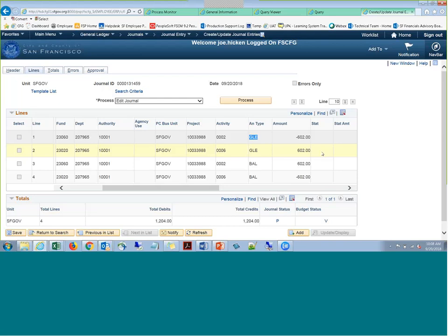Is that only for the grant abatement only, or should any abatement in the system use the MND and MNR? That's a good question. Sandra's asking, is this only grants related that you should use MND or MNR to abate from one cost to the other? I think at go live, our recommendation to AOSD and users writ large was to use MND, MNR regardless of what you were doing, just to flag exactly what you're doing with that transaction. But the effect on the GL is the same. The analysis type doesn't change the quality of the debit or the credit, right? It's just a reporting value. So if you're reducing a certain account, it's going to reduce regardless of the analysis type used. Good question.